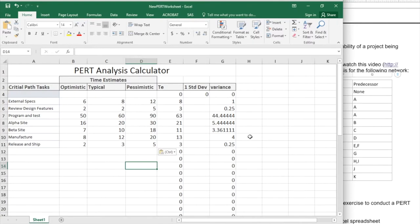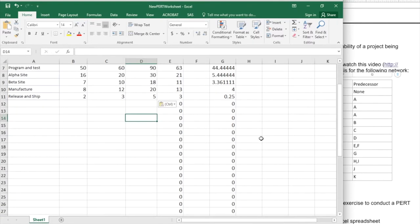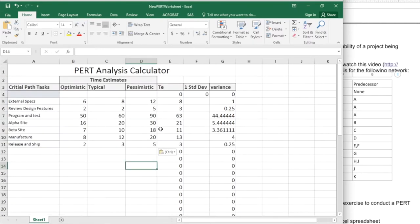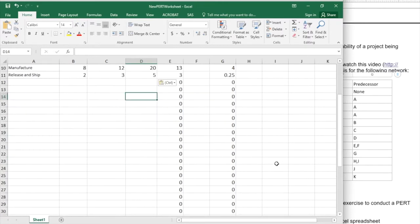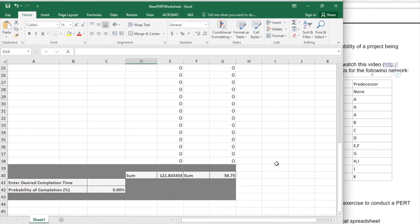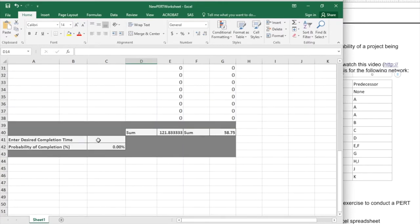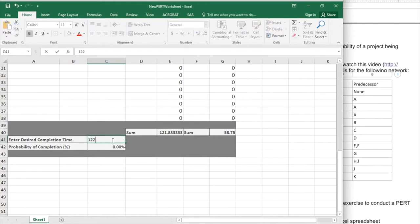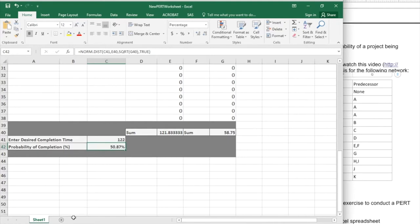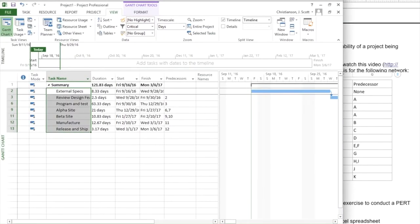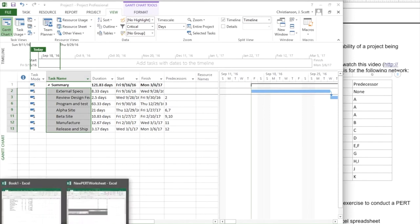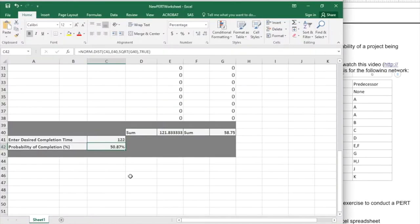Now that I've entered all that information, I don't have to worry that I have a blank up above here or down below, but I can come down here and I can enter a desired completion time. And we should be seeing something that's very similar to what Microsoft Project told us, right? 122 days approximately. It says I'd have a little bit over 50% chance of getting done within that time period.